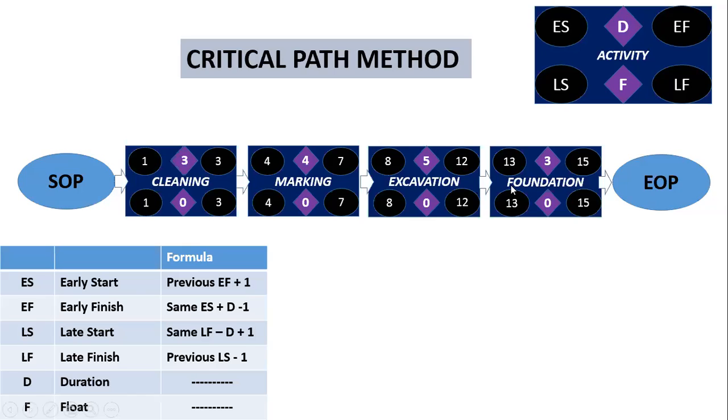Then we are going to the final task, that is foundation. What is the early start of the foundation? 12 plus 1, that is 13. Okay, it's simple mathematics. We don't have any formulas over here. It's simple mathematics. Then what is the early finish of the activity foundation?